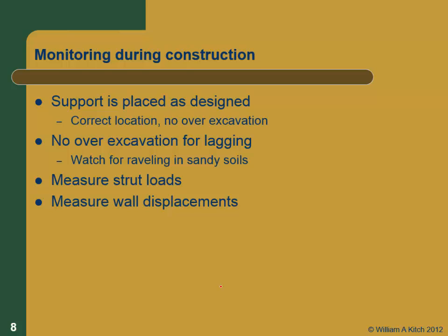And now, with the laser systems we have today, if you've got good control, you can do this with laser scanning. You can actually set up a laser scanner just in one place near or at the top of the excavation. You can actually measure a whole bunch of stuff. You do need to be concerned about getting control. You've got to have some control points that you can get baselines from for your laser survey. But using lasers now is a really viable technique for doing this.